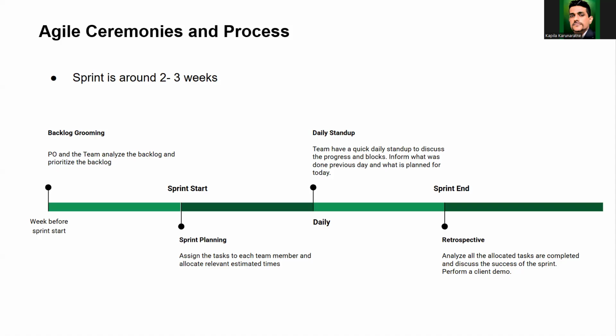Your sprint has these three main things: sprint planning, based on which you drive the work, then the daily stand-up, which measures what you have done, and at the end the retrospective, to make sure what you have learned and delivered is correct. If anything is left, for example you planned 3 stories but only delivered two, then one story is left and you need to put it into the next sprint. At the next sprint planning session, you need to take those spillovers and plan them.